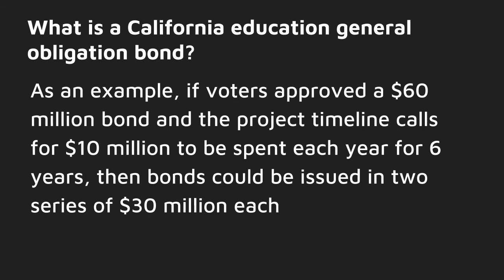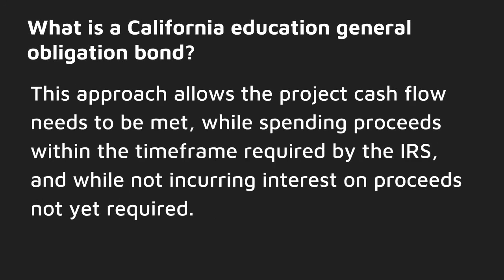As an example, if voters approved a $60 million bond and the project timeline calls for $10 million to be spent each year for six years, then bonds could be issued in two series of $30 million each, three years apart. This approach allows the project cash flow needs to be met, while spending proceeds within the time frame required by the IRS, and while not incurring interest on proceeds not yet required.